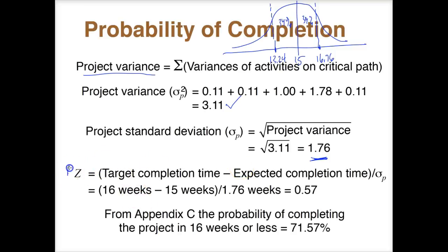Now, what this Z here is, this is what the corresponding Z score is. And from probability and statistics, this is the formula for it, which is the data value minus, in this case, the population mean divided by the standard deviation.